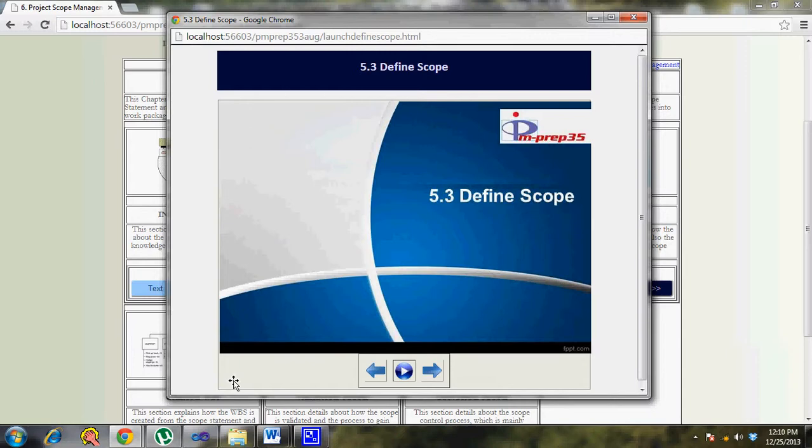So defining the scope is a lot more iterative in nature compared to documenting the requirements. The requirements have everything. It just keeps in mind the project objectives or the business objectives, and it pulls as much as possible from the stakeholders. But when you come to defining the scope, you weigh what time is available, what cost is available, and what is really important at this moment, and then you define your scope. So that's where the exclusions come into the picture, and they are very vital.